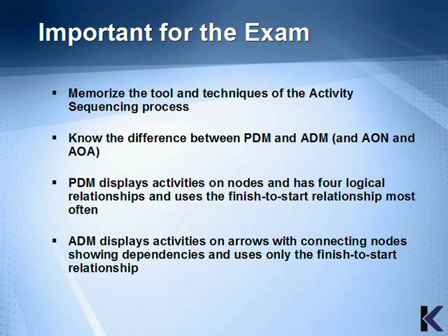The PDM displays activities on nodes and has 4 logical relationships and uses the finish to start relationship most often. The ADM displays activities on arrows with connecting nodes, showing dependency, and uses only the finish to start relationship.